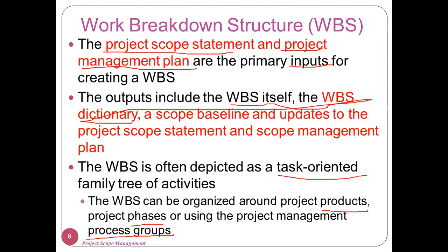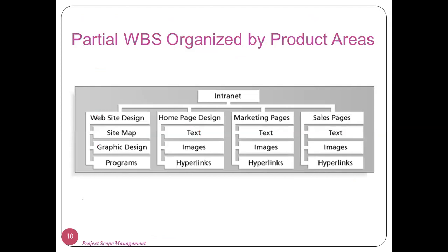And in the work breakdown structure dictionary, you have to give a description of each and every module about which you are going to talk and to which you are going to distribute the task. So the output would be the work breakdown structure and the work breakdown structure dictionary.